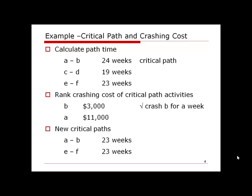If we only crash path AB and reduce it from 23 to 22 weeks, path EF remains at 23 weeks and still determines the project duration. Reducing one critical path while leaving another unchanged does not reduce the total project time. When multiple critical paths exist, we must reduce the time on every one of them simultaneously.